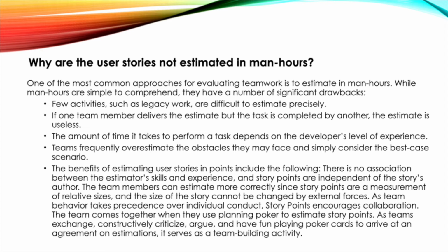The benefits of estimating user stories in points include the following. There is no association between the estimator's skills and experience, and story points are independent of the story's author. The team members can estimate more correctly since story points are a measurement of relative sizes, and the size of the story cannot be changed by external forces.